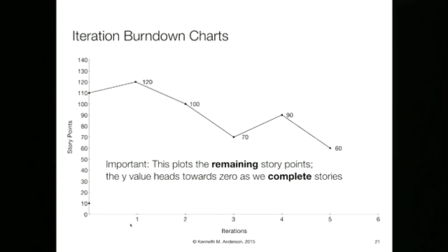So you have discussions, and even though you got 20 points worth of work done, they've added 40 points worth of work in terms of new requirements that suddenly became clear. And so in your burn down chart, even though you might have made progress, that's all lost by the fact that more stories were added. What you show is how many points are remaining, not yet completed, in this graph.